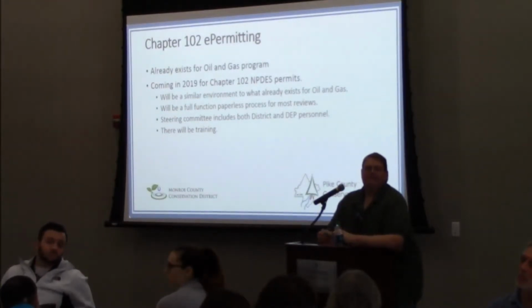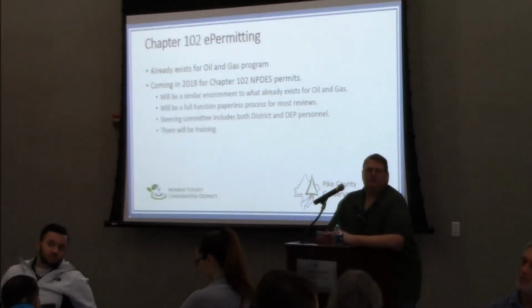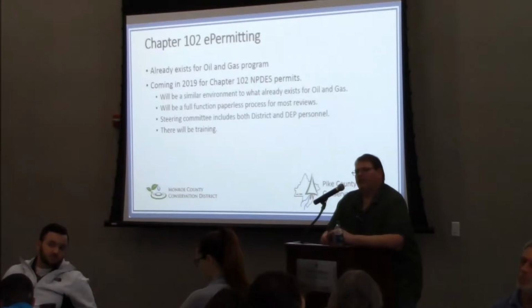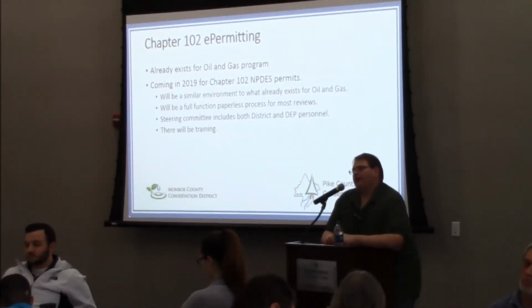Yes, sir. For non-NPDES permits, if you have to submit an E&S review to the Conservation District, will that still go through the e-permitting system? No. So the question was, will plans that are not NPDES permits have to be submitted electronically? So if it's just an E&S plan, that would still go through the district under the typical district policy.